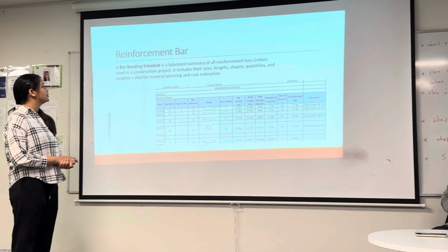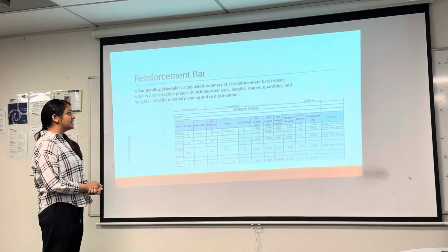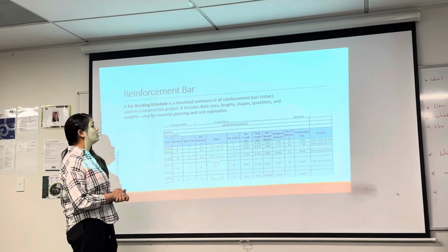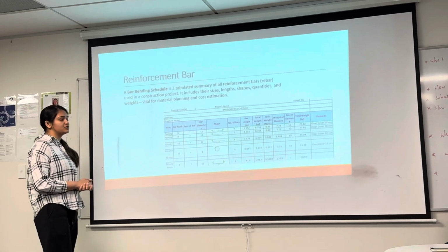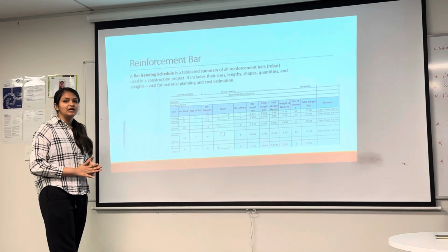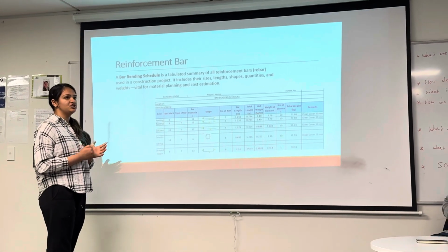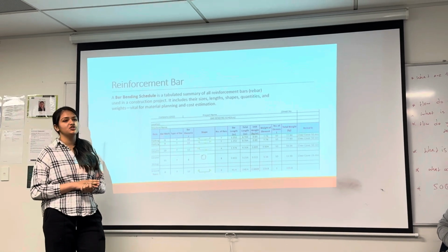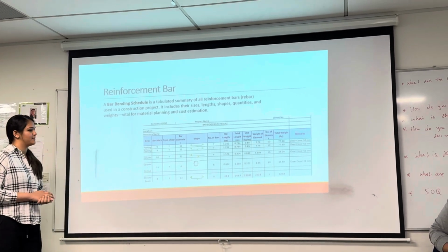The reinforcement bar, a bar bending schedule, is a tabulated summary including all the bars used in a construction project. It includes size, length, shape, and quantities, and is used for cost estimation in construction projects.